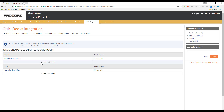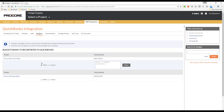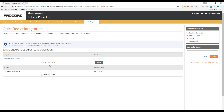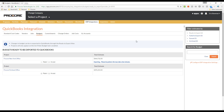If I select Reject, a comments area appears where notes can be entered. The notes entered here are included in an email that will be sent to the person who sent this budget to ERP, letting them know their entry was rejected. It is always a good idea to include enough detailed information so that this person knows exactly what they need to do to correct it before sending it back to ERP again. Alternatively, if we choose to accept it, the Export button appears. And all we need to do to get this sent down to QuickBooks is click it. This may take a moment to complete, and when it does, the message here will change to show that it was successful.